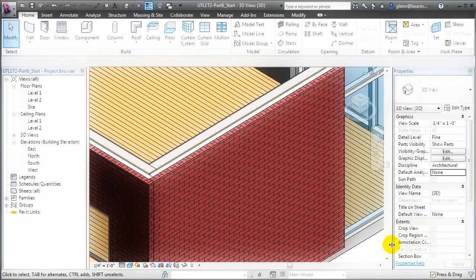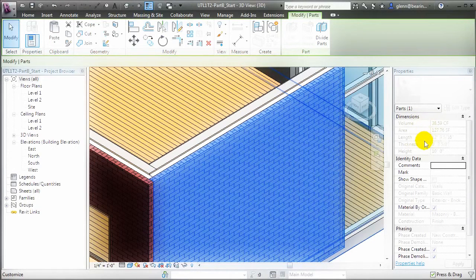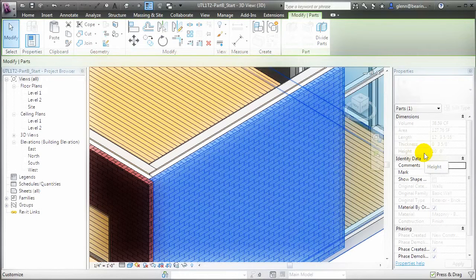We can select individual parts, and when we do, notice that in the Properties palette, the volume, area, length, thickness, and height of the part are all reported. So we can get accurate quantities for that individual part, as opposed to the entire wall element.